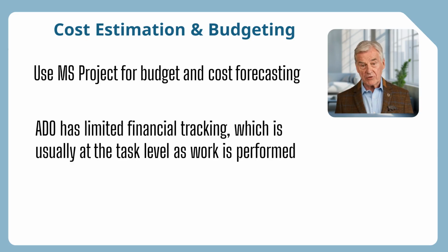ADO tracks effort usually in story points or hours, but is not as effective as MS Project in total cost or budget estimations and does not adequately connect effort to labor cost. It usually requires exporting of data to other tools if financial analysis or tracking is needed. If executive leadership needs cost projections, use MS Project.